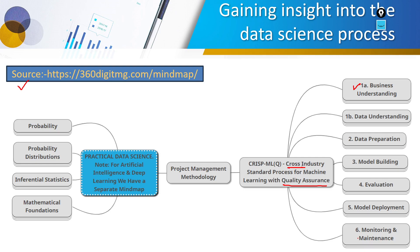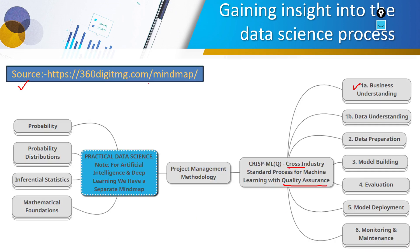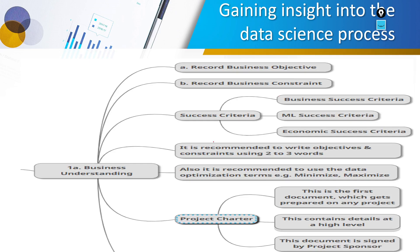In this way we have six different steps. Now for business understanding — in industry, when we deal with different types of projects, we should convert that problem into a proper business statement. What is required in business understanding: first, we should record the business objective; we should define our business objective, and second, we should define our business constraint.